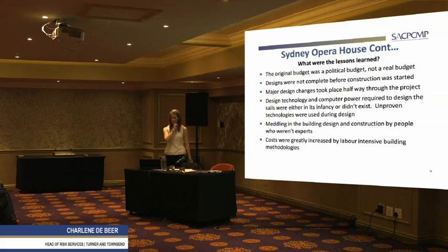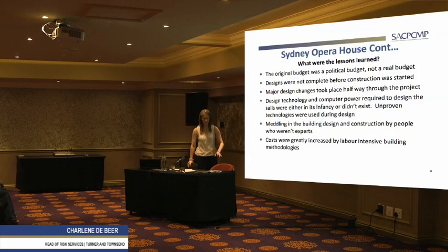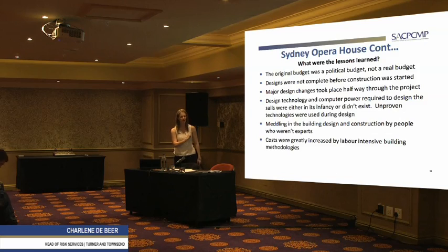Then they had the meddling in the building design, and the construction people weren't experts. So you had a government wanting to build it, with no construction background, that didn't really make use of an owner's team or an EPCM team. And then, of course, in the building design, after 7 to 8 years, they fired the original architect and brought 4 new architects in, which caused total chaos, with validation from scratch. They had their own ideas, trying to implement their own way. And that also just derailed the whole project even further.